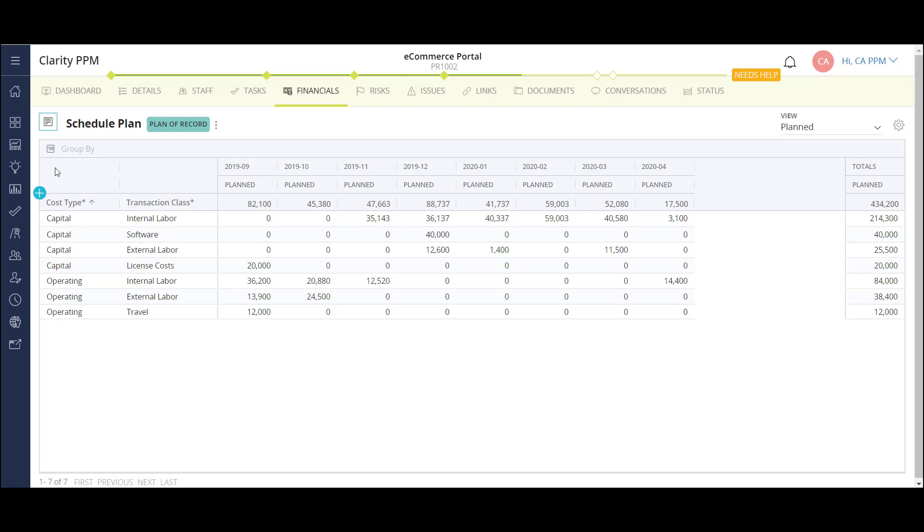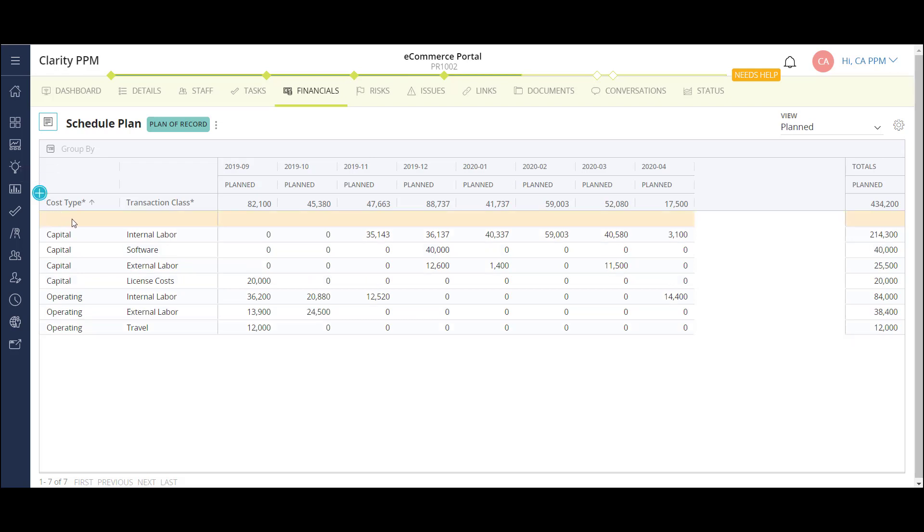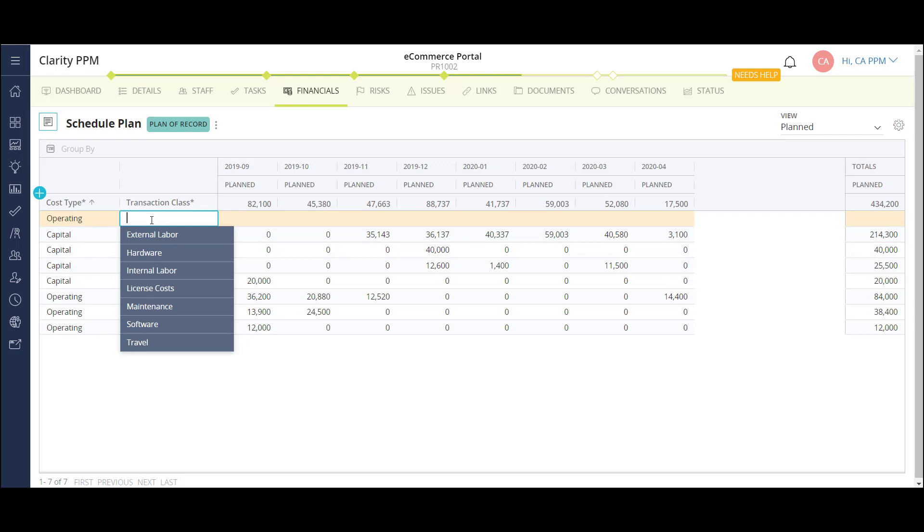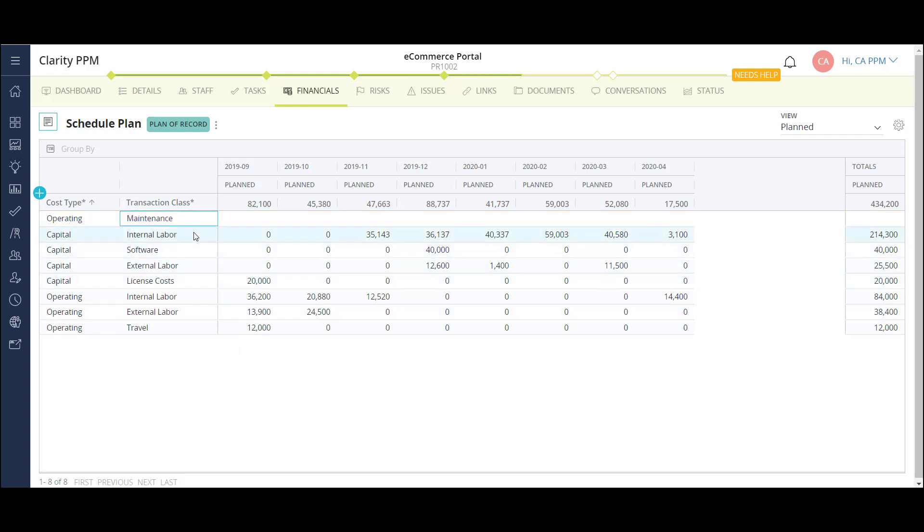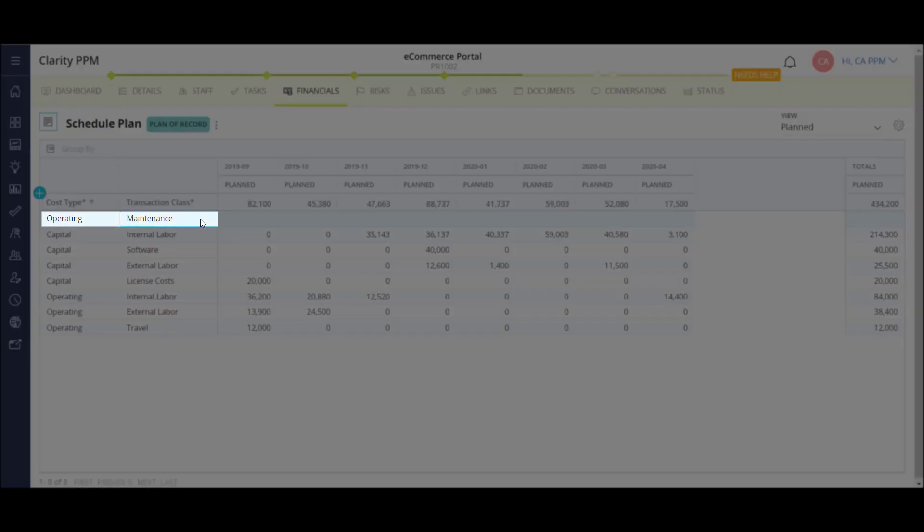Now that we've looked at how categories can be configured, I'll show how to update the plan costs for the cost plan. The grid can be populated in the following three primary ways. I can manually enter the plan costs by clicking the plus sign button. A new row populates, and I can fill out the required criteria for my cost bucket. In this case, I selected Operating and Maintenance. Then, using my keyboard, I can tab over and enter in the costs month by month.